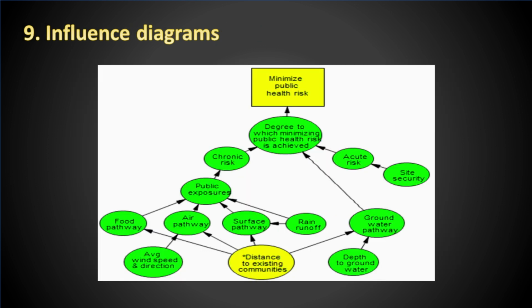Influence diagrams. Influence diagrams are plotted to show the relationship between variables involved in the decision-making process, in the context of uncertainty that is inherent. Influence diagram uses shapes to show areas of uncertainty: oval, decisions or choices; rectangle, desired outcome; octagonal, and influences between them. This technique is used in the perform quantitative risk analysis process.